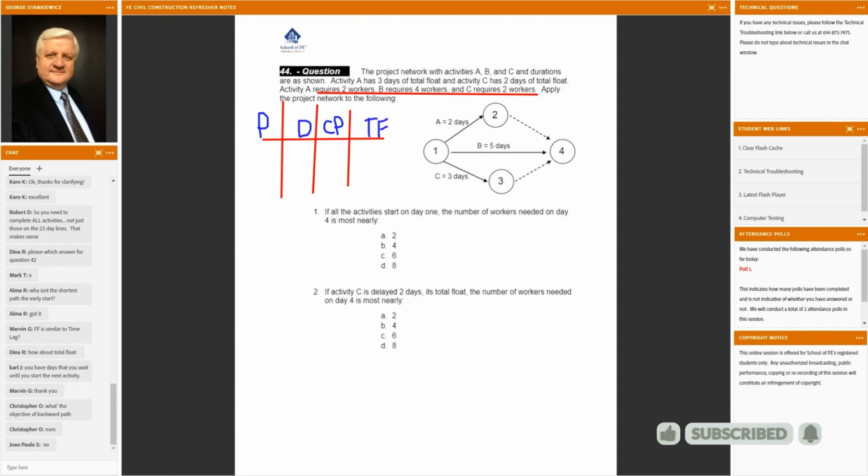But let's take a step back and see what the dummy does. Let's eliminate the dummies. Let's forget about them. They don't exist. If I get rid of the dummies, that means I have 3 activities that are not connected. That's it. It's like 3 random activities. It's not a network, and as a result, when I put the dummies back in, they provide the network logic, as we explained when we looked at that. So now this is a project where 3 activities have to come together for it to be finished.